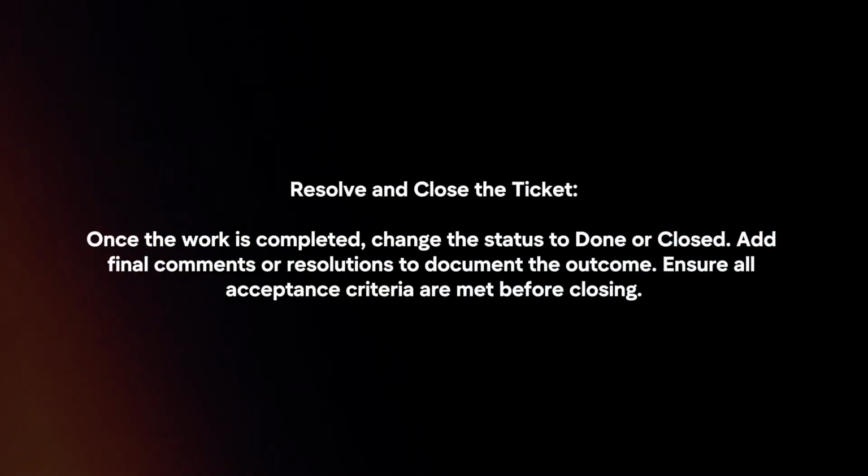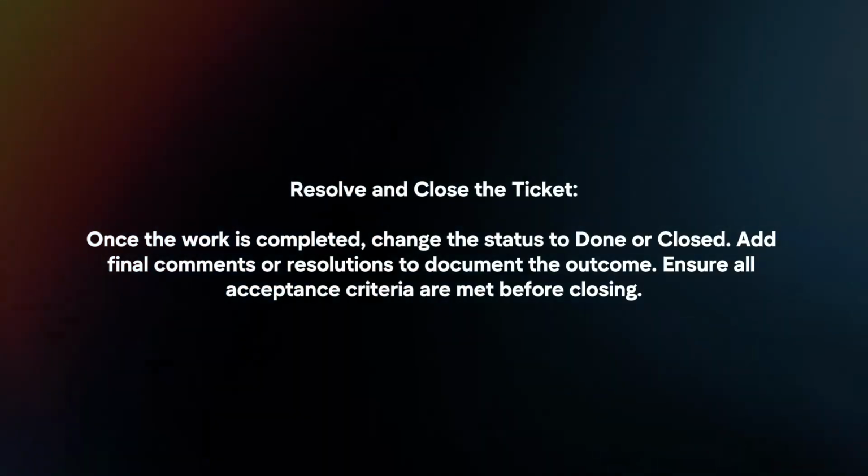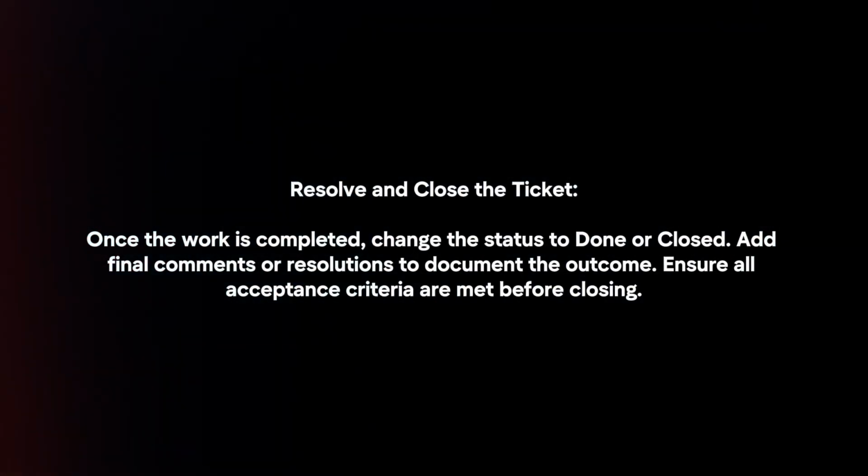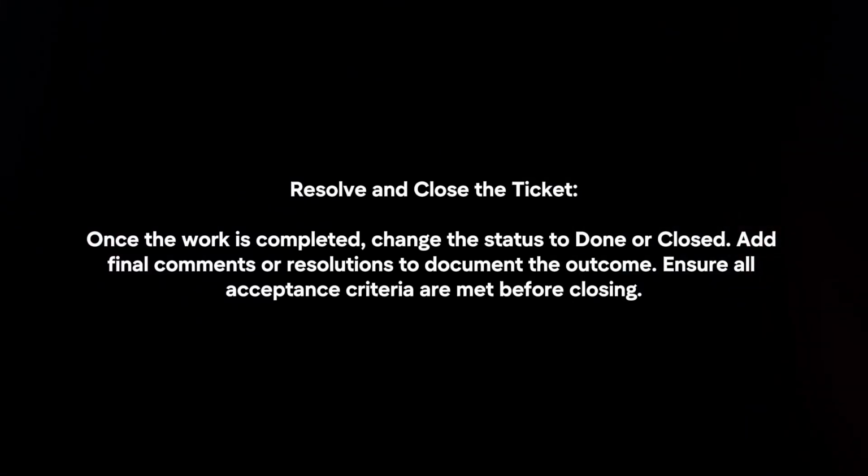Resolve and close the ticket. Once the work is completed, change the status to done or closed. Add final comments or resolutions to document the outcome. Ensure all acceptance criteria are met before closing.